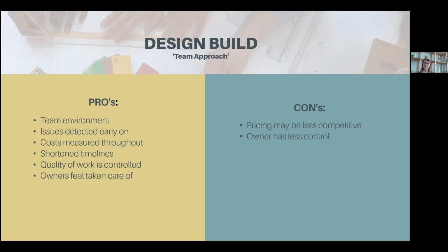Because the team already has an electrician, and it's nerve-wracking for them to bring on someone they don't know, because they don't know if they can trust the quality of their work and the timeliness of their work. So generally the owner doesn't have that control to choose the team members within the sub parts of the team. It's controlled by the GC or the designer.